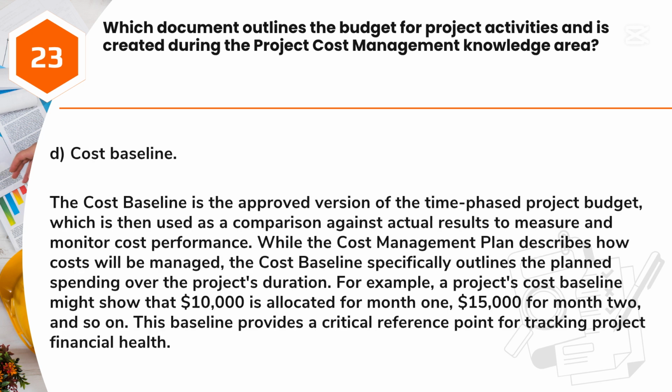Answer: D. Cost Baseline. The cost baseline is the approved version of the time-phased project budget, which is then used as a comparison against actual results to measure and monitor cost performance. While the cost management plan describes how costs will be managed, the cost baseline specifically outlines the planned spending over the project's duration.